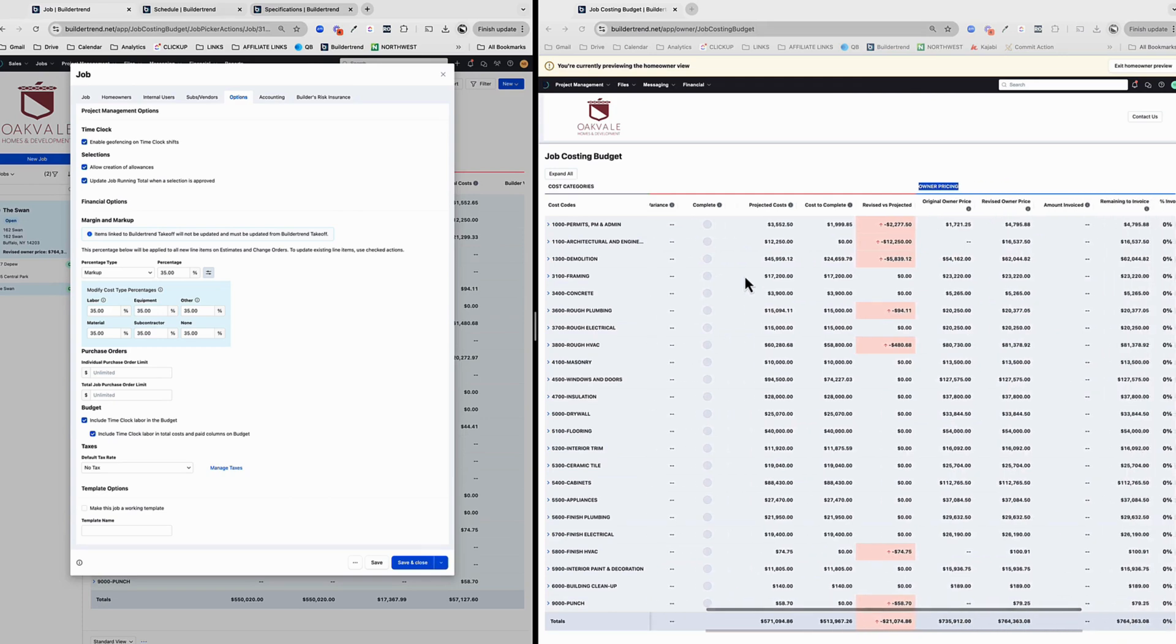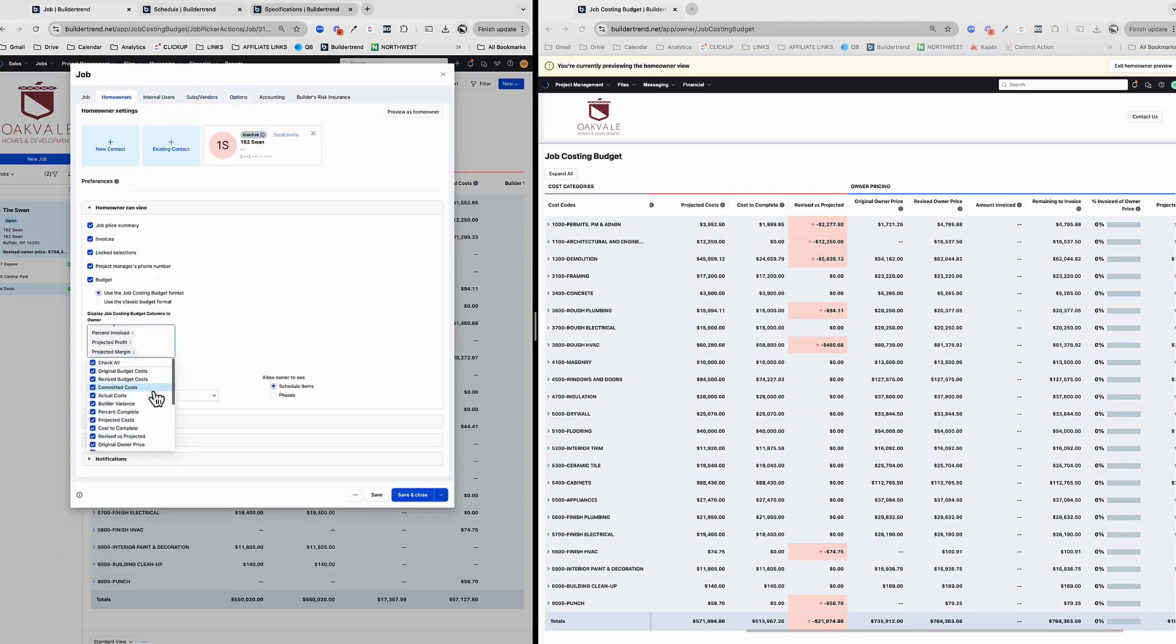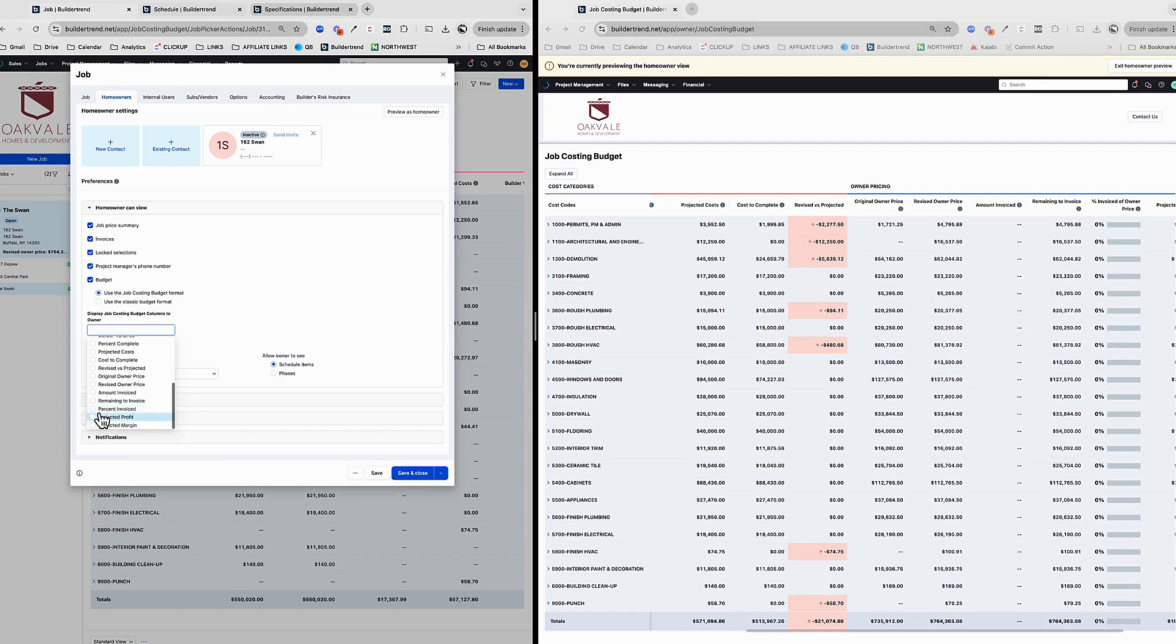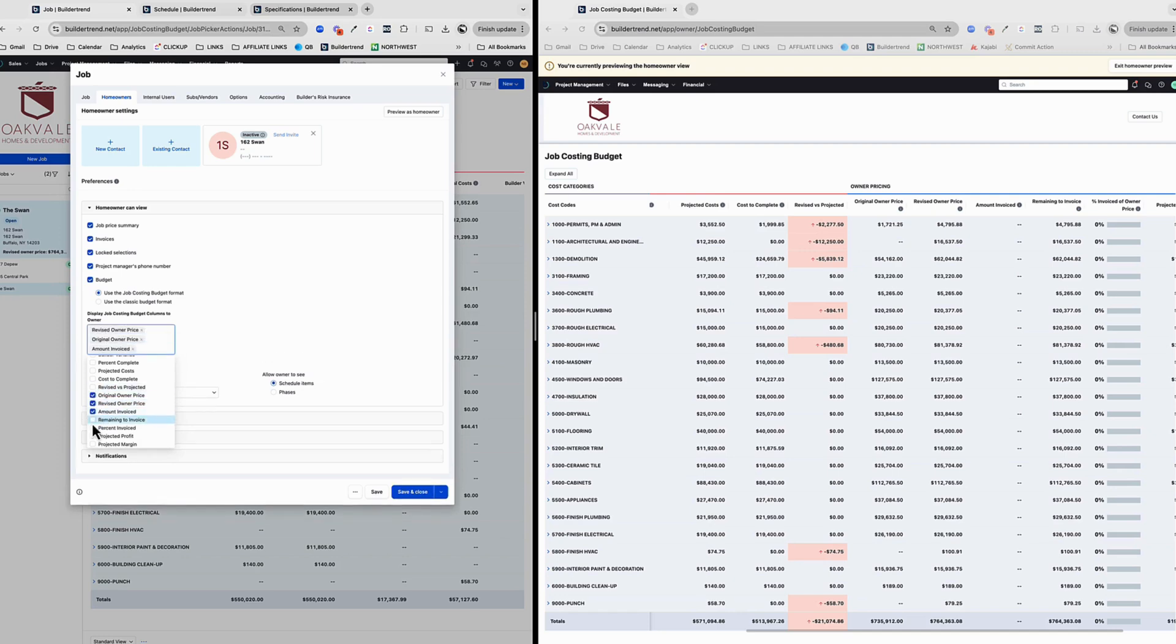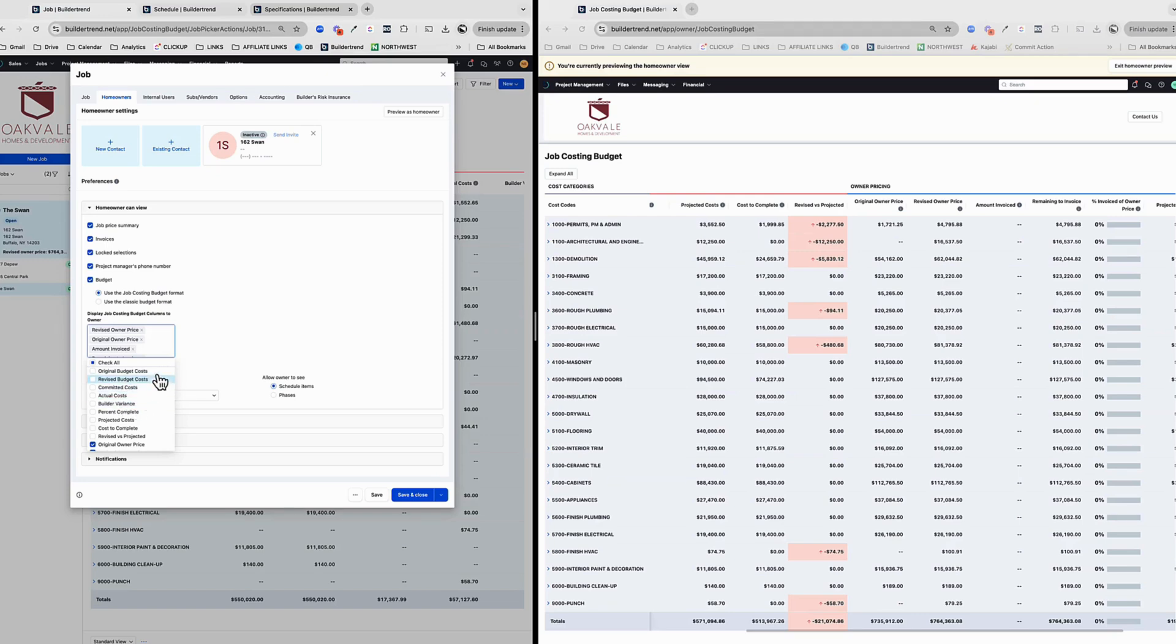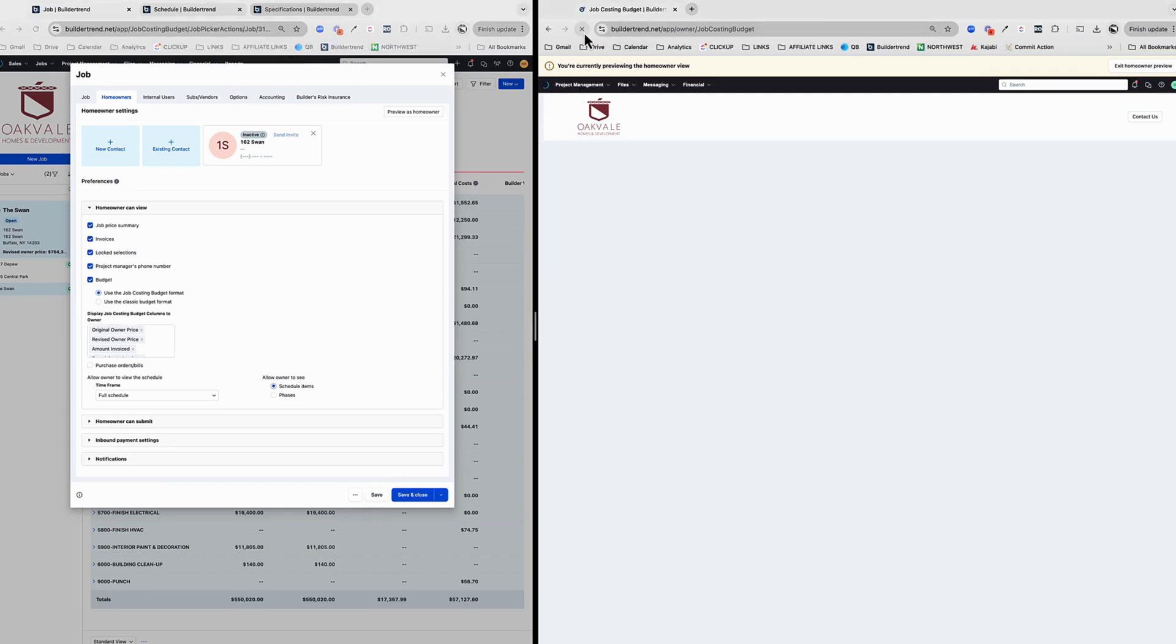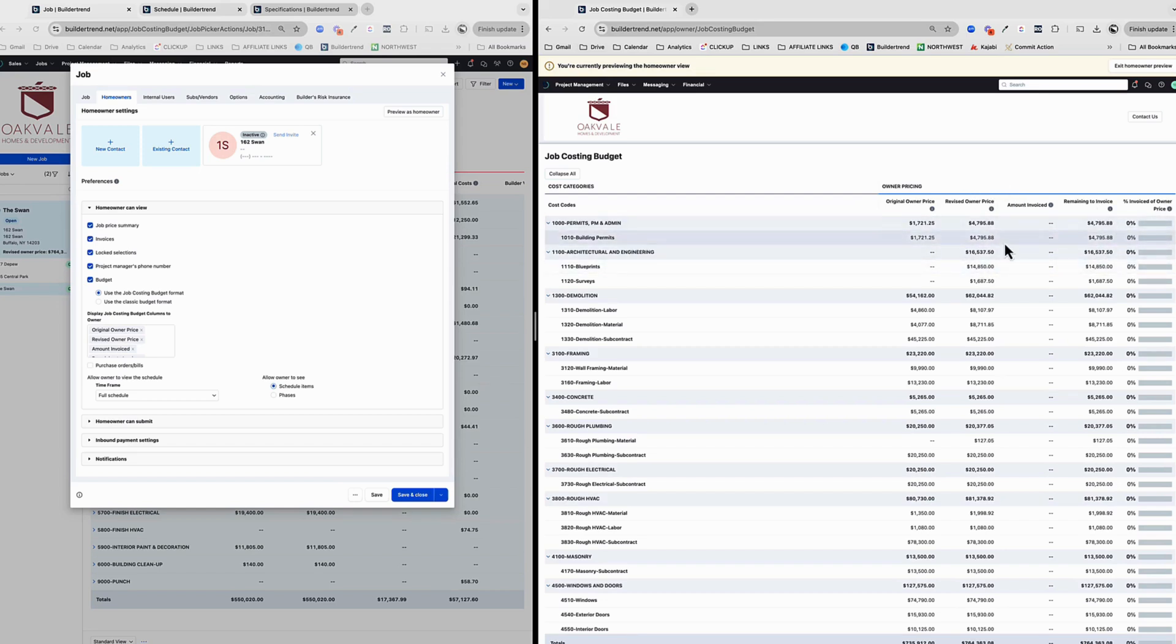So they're able to take that into account. And that happens in options. So here's my percentage markup. 35%. And they also added this cool thing where we can indicate the cost type markup. Now, again, I'm going to show you this in a separate video where we really dive into the job costing budget. So for now, let's just assume this is there. But I have a markup that goes into my revised owner price. BuilderTrend is calculating all that for me. It's really useful. The problem I have with this as a default is that I'm showing my customer way too many columns. We're going to need to dumb this down a little bit. And I don't say this with a negative connotation that they can't handle it. But I don't want them to see all that goes into that. What they should care about most is what their price is. So I'm going to go into, on my left side, again, I'm going to go into homeowners. I'm going to look at all the columns that are available here. I'm going to uncheck them and really start to think about what does my customer want to see.